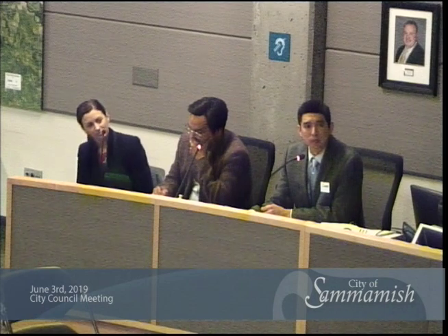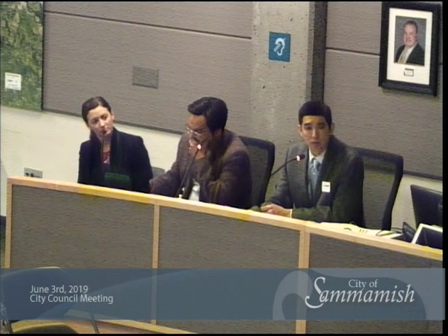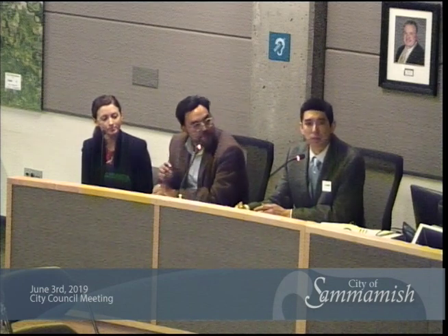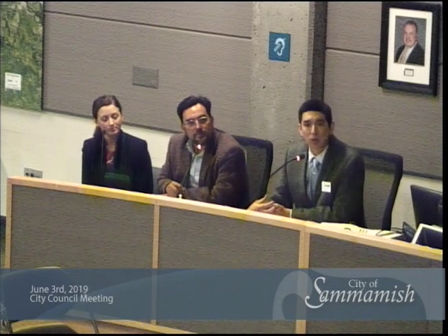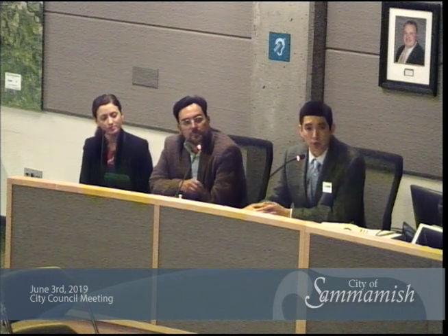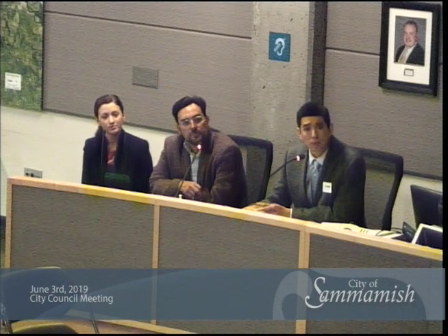Thank you for the question. That's a good point to clarify. So to the southeast of that parcel is what's called a critical aquifer recharge area. I believe it's a class 2, otherwise known as a CARA. That has been identified. So through the development review process, all of that would need to be identified, delineated, and then there would be a review process through the community development department about what the setbacks are, what kinds of mitigations would be required to ensure minimal impacts to the critical area. But that's more readily workable, and while we want to respect the aquifer always, of course, we're sensitive to that versus some of the other critical areas as we've classified them in our city.